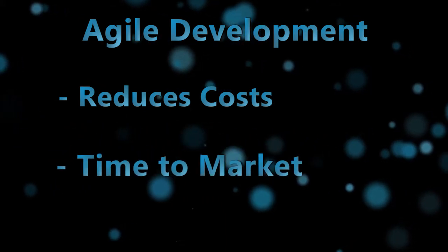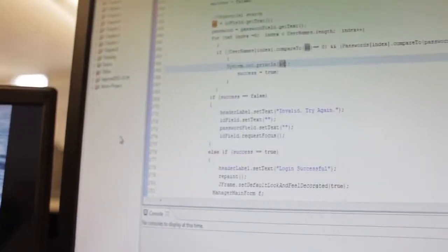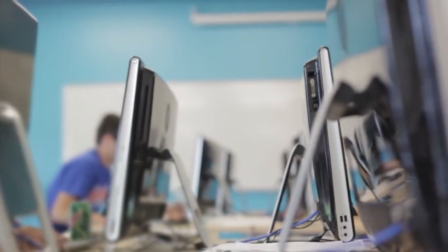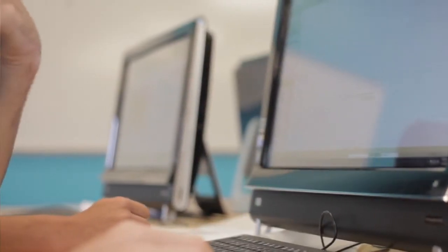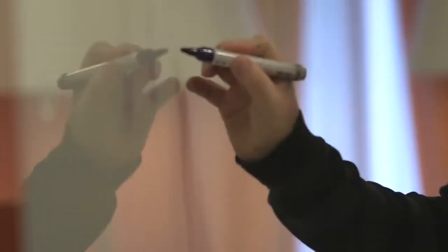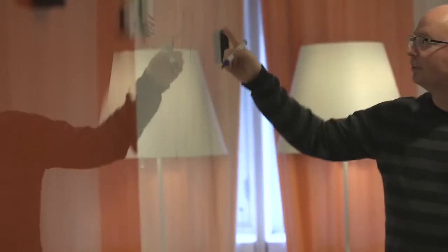Because teams can develop software at the same time they're gathering requirements, the phenomenon known as analysis paralysis is less likely to impede a team from making progress. And because a team's work cycle is limited to 2 weeks, it gives stakeholders recurring opportunities to recalibrate releases for success in the real world.